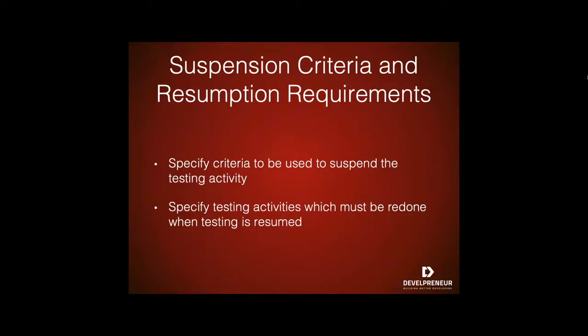Suspension criteria and resumption requirements. So this is kind of where you look when you're in the testing process: when do you need to stop testing and when do you need to restart testing? So know when to pause in a series of tests or possibly terminate a set of tests. Once testing is suspended, how is it resumed and what are the potential impacts on, for example, your regression tests? If the number or types of defects reaches a point where the remaining test has no value, it makes no sense to continue the test. You're just wasting time and resources.